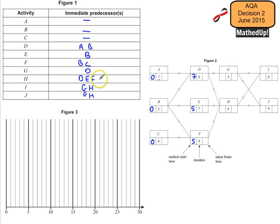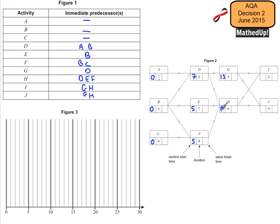In order for G to start, D needs to be completed. D starts after 7 minutes, so add another 6 minutes, making 13. In order for H to start, each of these 3 activities need to be completed: 7 plus 6 is 13, 5 plus 7 is 12, 5 plus 8 is 13. So it needs at least 13 minutes before it can start. For I to start, G and H need to be completed: 13 plus 5 is 18, and 13 plus 6 is 19, so it's going to be 19 minutes at the earliest.